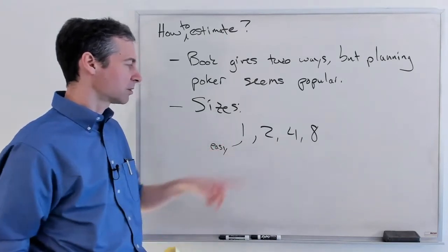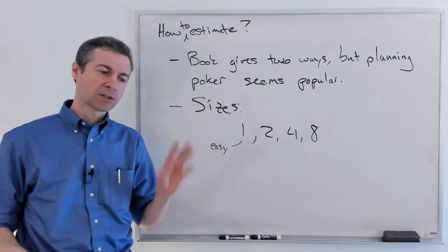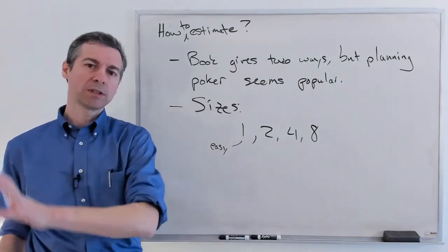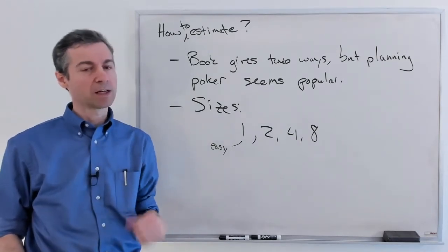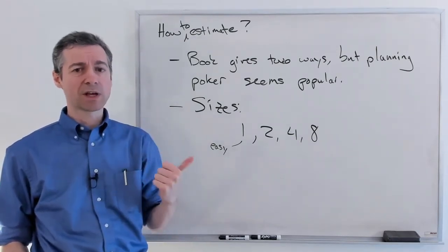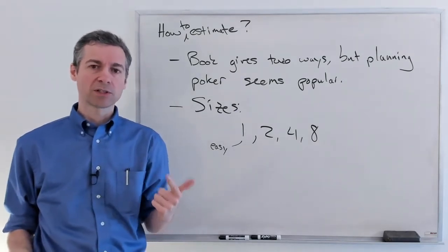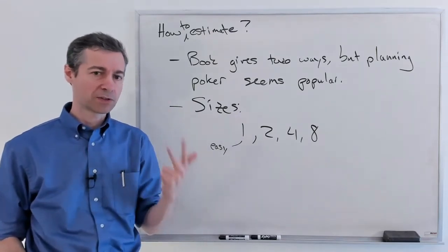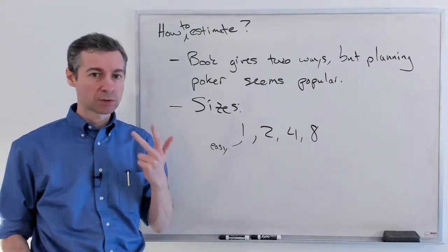But these are the stories that I talked about previously, where from the time you start working on them to when they're completely deployed and available to the customer is 3 days. And again, that really means that you get your design done in a day, you get the implementation done, and then the code review and the deployment is done in a day. That's 3 days. Now remember, these are 3 school days.